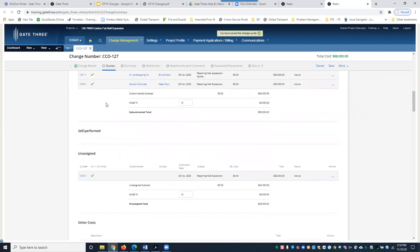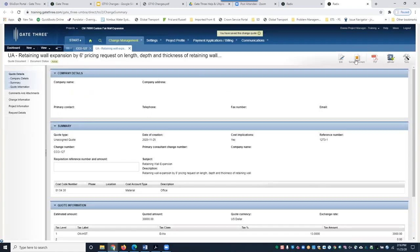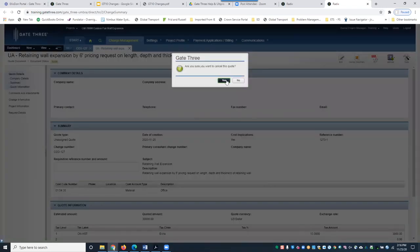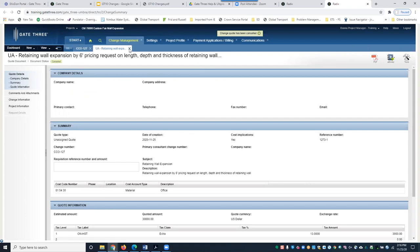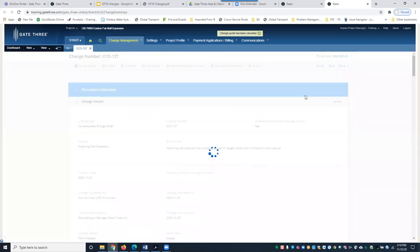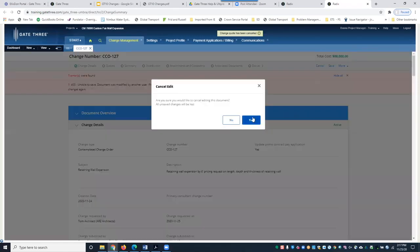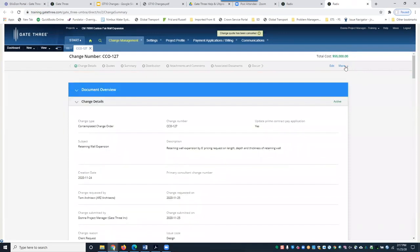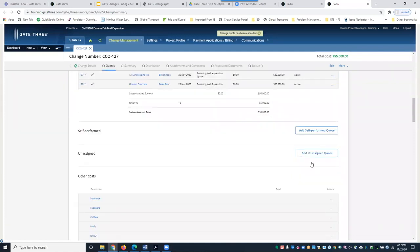If you decide to remove a quote entirely before sending to the owner, click Open Quote and then Cancel Document. Confirm the cancellation. After refreshing, that canceled quote will no longer appear in the change document. You can also include or exclude canceled quotes from your view, and you can view taxes if needed.